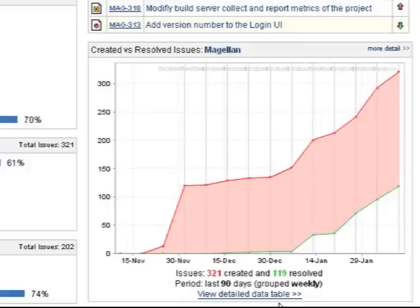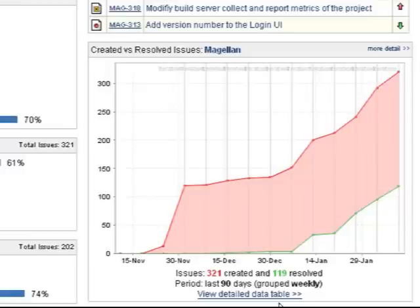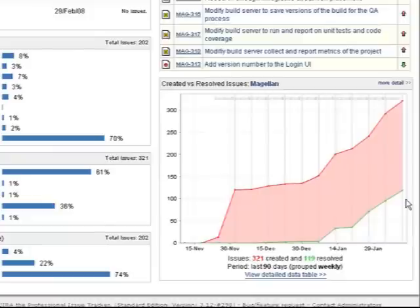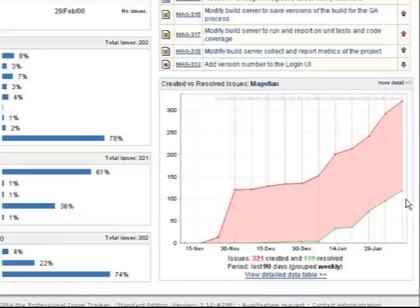So now what I am not illustrating here, and this is partially because I have set up my point user-defined field as a text field and not a numeric field, is this particular chart is only associated with the number of issues within my system. So right here I'm saying that right now I have 300 and some issues within the system, of which 100 and some have been completed. Now what is missing is the weight of those points.